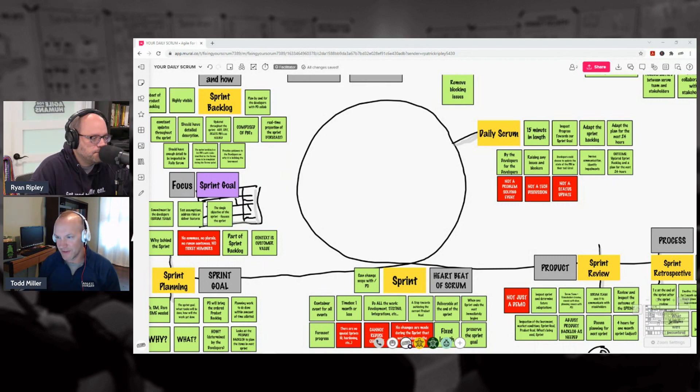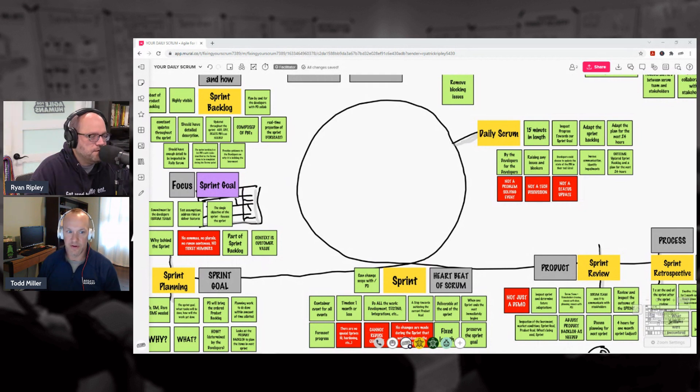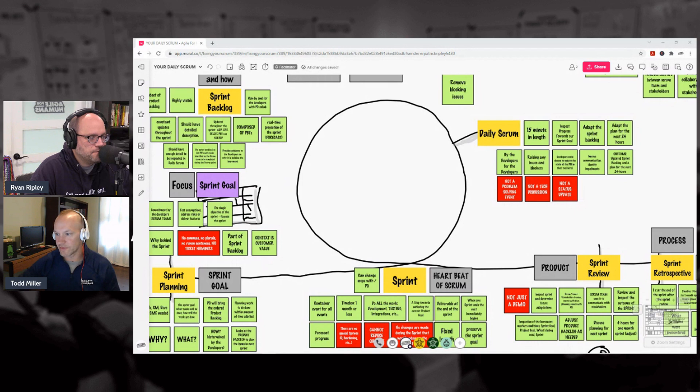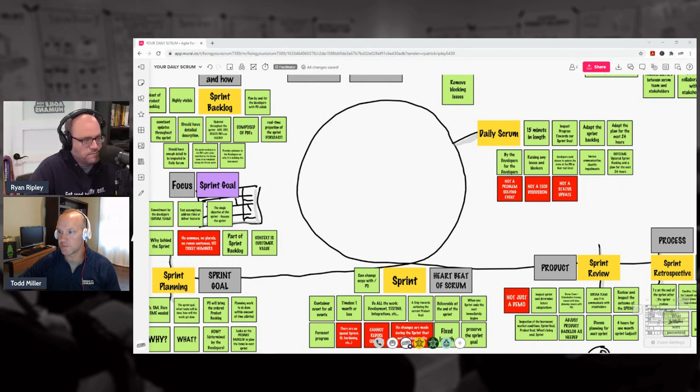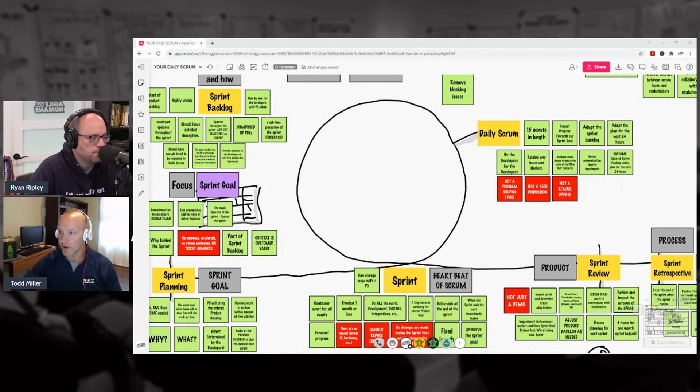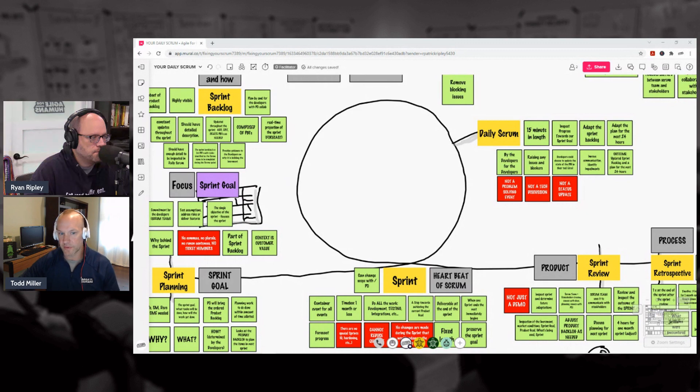So we ended up having to have another retro. We ended up having to have another retrospective. So I don't think that you can inspect your process until you've inspected the incremental progress that you've made on your product. I think that's fundamental to the way I—the Sprint Retrospective has to be after the Sprint Review.